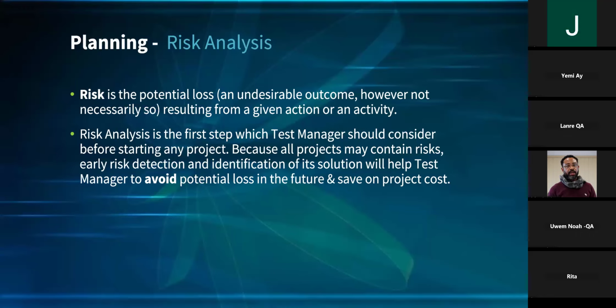Three is that the connectivity is a new one. I need to also highlight that it can cause a delay too, because it takes forever to raise tickets for them to answer you. All those risks can delay the testing coming out. So I need to highlight that. Also, if we don't have the right environment to put all this in, that is a risk you need to bring out when you're analyzing.